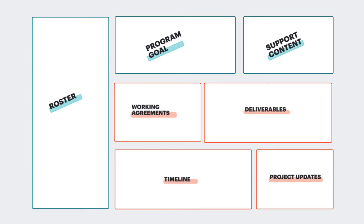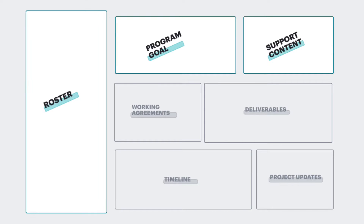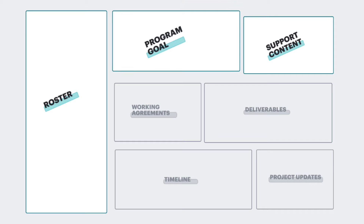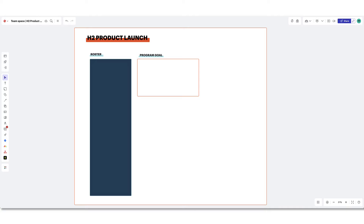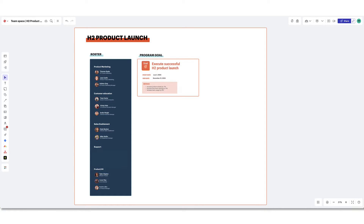Content that provides focus and direction is going to be your reference resources. This information is rarely going to change through the span of a project. Material that falls under this category is going to be your roster, project goals, and support content for the project. Your roster and project goals are typically going to be added directly to the board and should be filled out before your first meeting with the team.